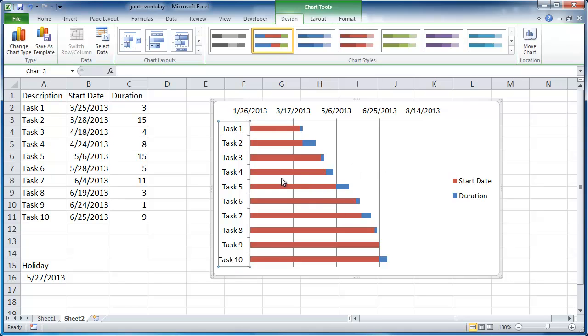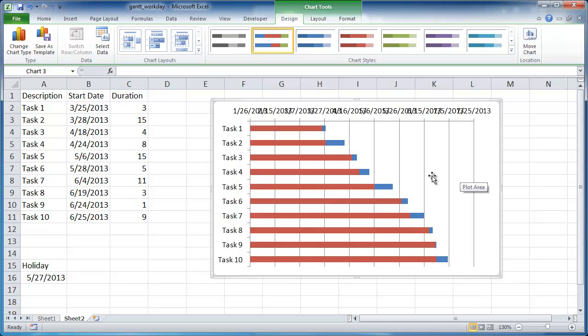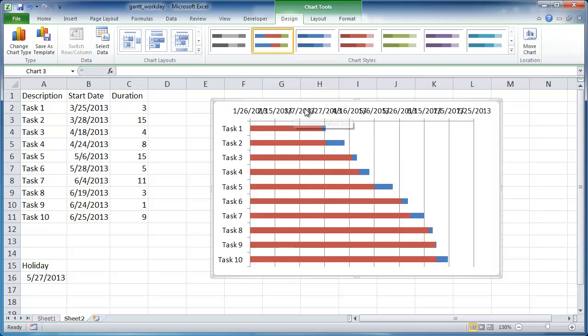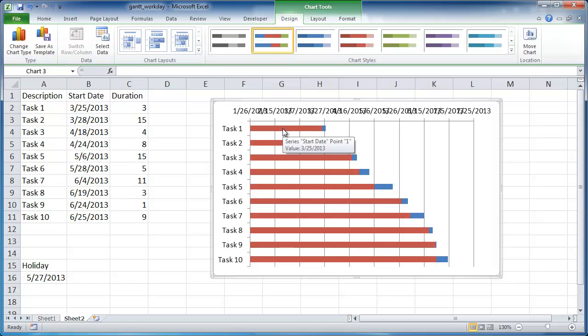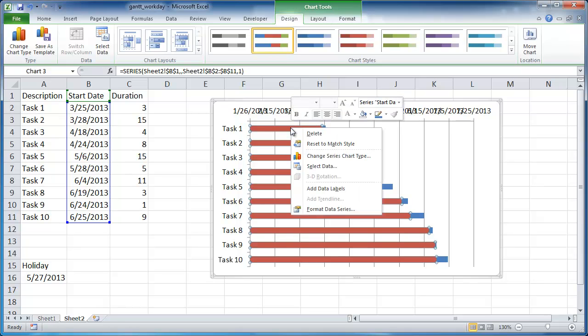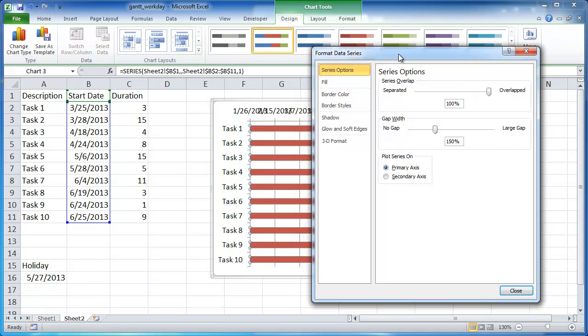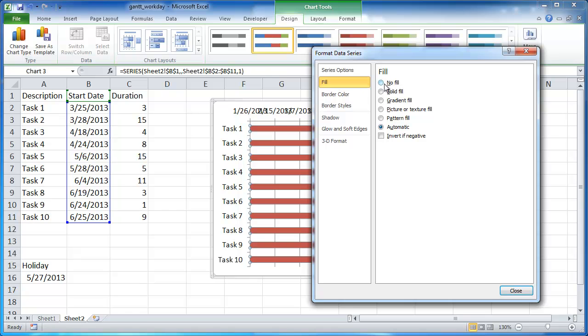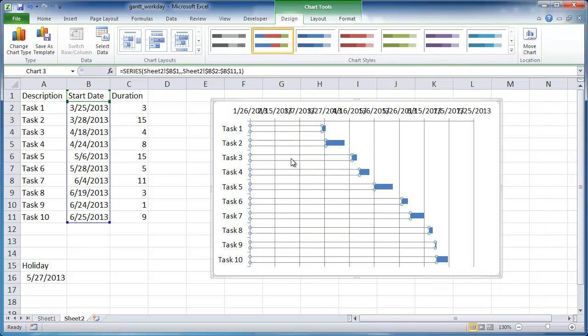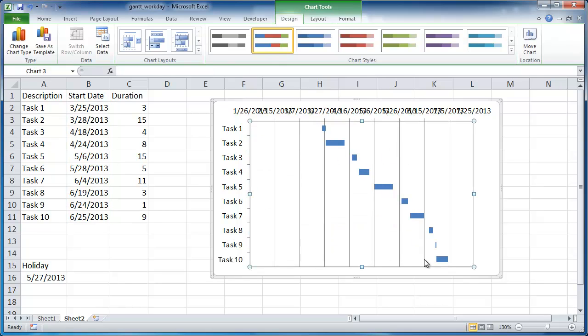Now another thing I want to do is I don't want to see this, I don't want to see the legend. Let me go ahead and get rid of the legend. Let's select that and press delete. And I don't want to see this start date line. I want to make that invisible because I just want to see the durations because the durations start in 3/25. You can see that there's another kind of formatting that we need to take care of here. So what I want to do first, let's go ahead and just change these lines. And we can select that. You can see it's selected here, right-click and go into format data series. And with the fill color I don't want to fill, so I'll just select that radio button, click close. And you can see now it's gone.